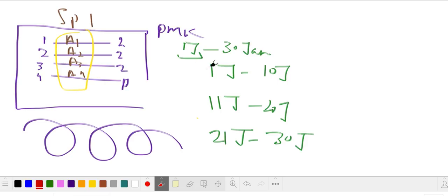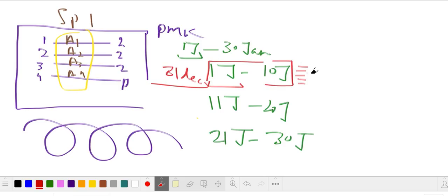So suppose on 31st December or on 1st January, I plan each and every small detail of the first sprint. I'm telling what I'm doing in this sprint. I talked about the activities, I sequenced them, I know who's doing the activity, who's on leave or who's not, I know all the details.